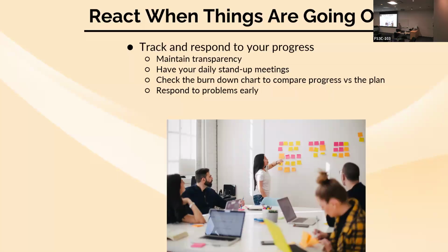So that way, if someone has something that is absolutely critical for our product, actually critical for the success of our build, and they're struggling with it, maybe we could reassign tasks, right? Give it to someone else. Like, I'm going to take you off of that one, I'm going to give you this one instead. We're going to restructure this so we can go forward.